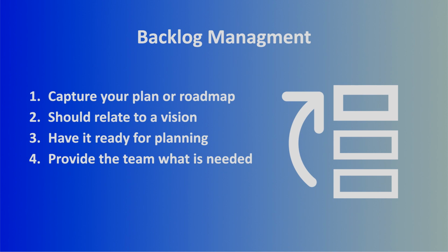And you should be able to really fill in all of the information that the team's going to need to do that work. And now an important thing to keep track of here is that you're not telling the team how to do the work, you're just telling them the what, the who, and the why. And that's all the information the team needs really to be able to take that and make a plan. Obviously, if you can provide some more details, that's good. If there are things that you specifically don't want, list that in the item. But you don't want to get overly descriptive on how the team should do the work. You want to leave them some room to figure out how to get that done. After all, they are doing the work. They're probably in a good position to determine that.